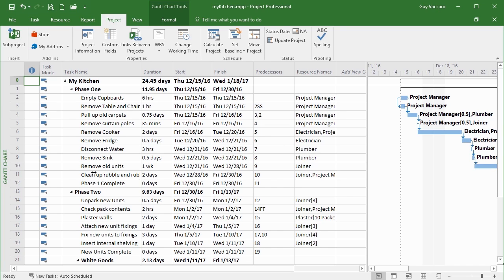Once you've moved your project start date to the correct date and all the tasks have moved henceforth, at that point, we would set what's referred to as the baseline. And what the baseline is, is a copy of each of the current task start, end date, and costs, so that we have a measurement point, so we can measure ourselves against the baseline.